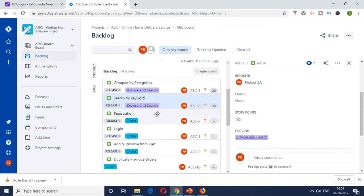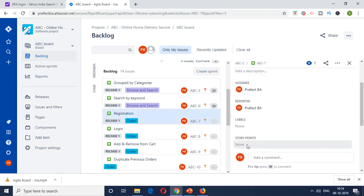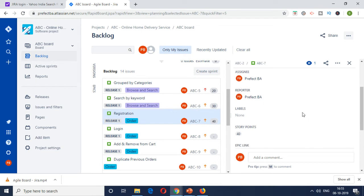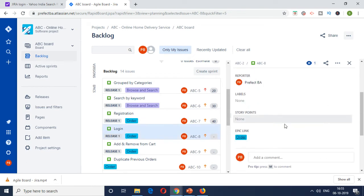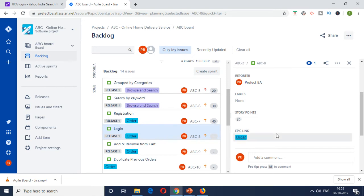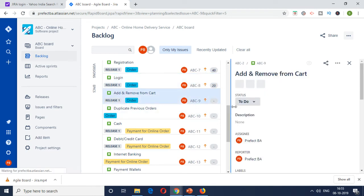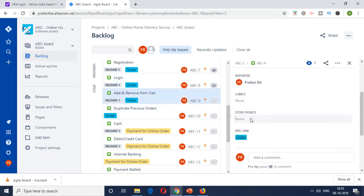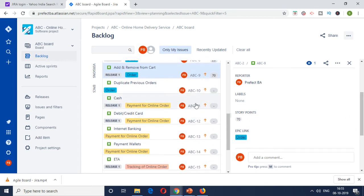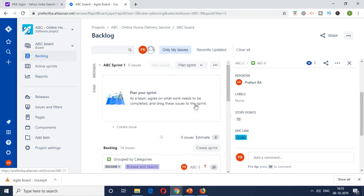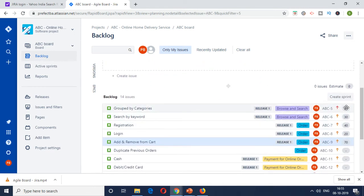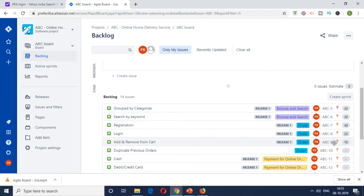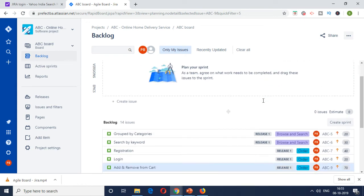Then I'll put the search feature as 30 story points. Similarly, I'll go to the registration one. I'll put it as 40 story points. Again, I'm just giving some random numbers, but in an ideal world, this would be done in consultation with the team. So that's 20, 30, 40, 20. I'll quickly go to the next one. Add and remove. I'll give it as 70 story points. Then, so you get the idea basically what I'm trying to do. So all this estimation has to be done and you can see the estimations. Once it is added, it will be visible here in the product backlog. So as I was telling, a hundred story points is the capacity of a sprint.